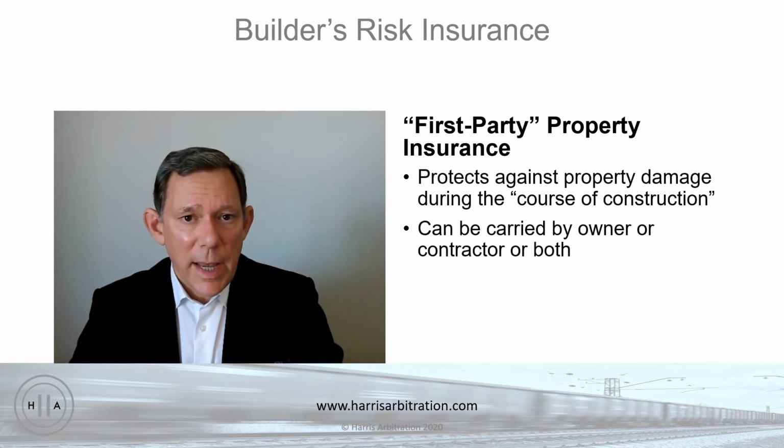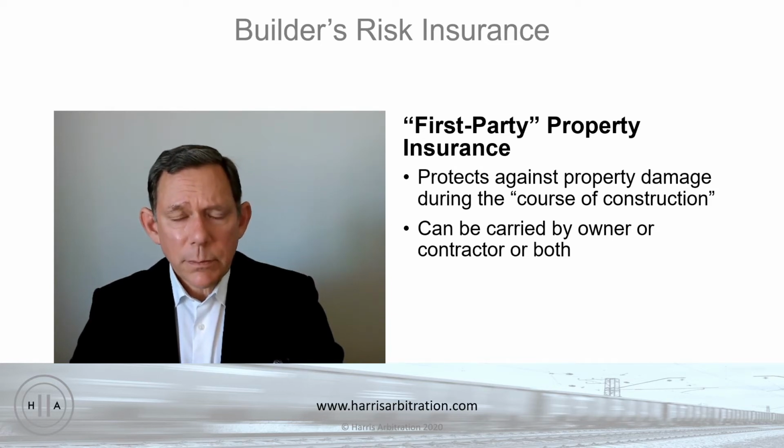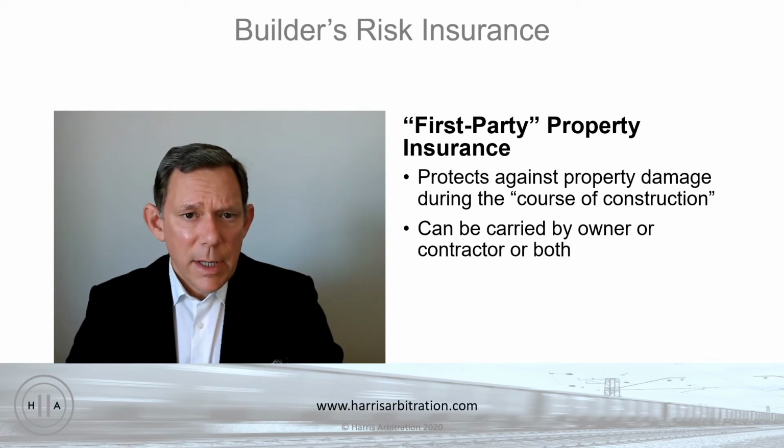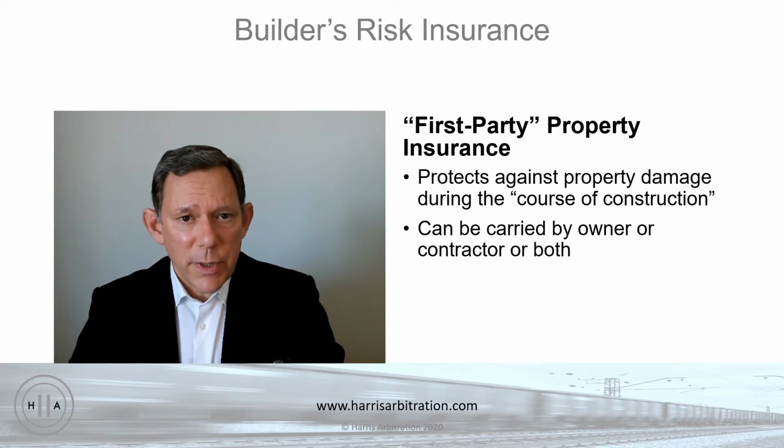construction-related risks have their own kind of coverage available, as opposed to general commercial property insurance, which again, businesses of all sorts have, but builder's risk insurance is a specific kind of commercial property insurance that's designed to protect the property that's most at risk during the period when the risk is highest, that is during the construction process itself.